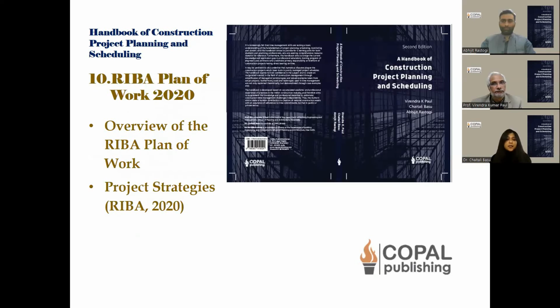Initiated 62 years ago, the RIBA Plan of Work provides a framework for efficient project management, organizes the process of briefing, designing, constructing, and operating buildings into 8 specific stages, and explains the stage outcomes, core tasks, and information exchanges required at each stage. This chapter elaborates on the project strategies as per the RIBA Plan of Work, including the new core stage, Design to Manufacture.